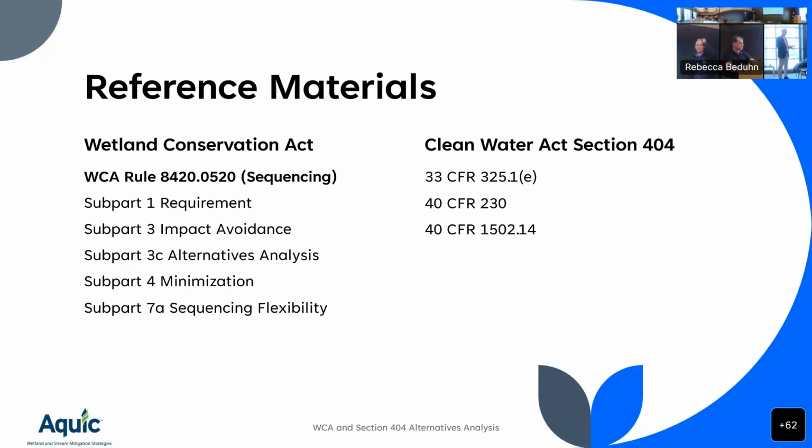We also have to do a public interest review. There's 21 specific public interest factors we have to evaluate. We also have to comply with the Endangered Species Act, National Historic Preservation Act, our tribal consultation responsibilities, a slew of executive orders. And so there's a lot of stuff going on that the project manager is thinking about and evaluating, and asking questions about of an applicant or consultant. So there's a lot more going on than just the stuff you find at those records, those citations there.